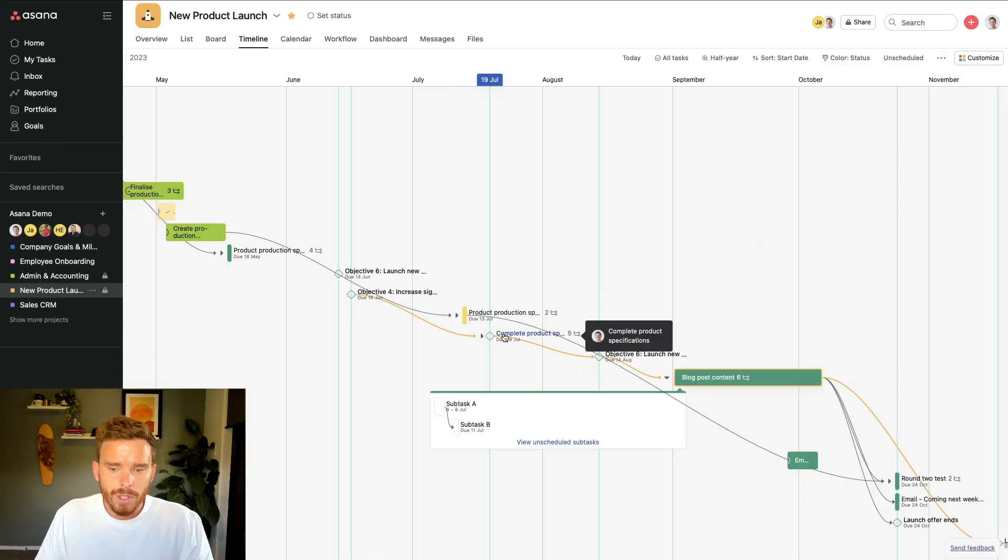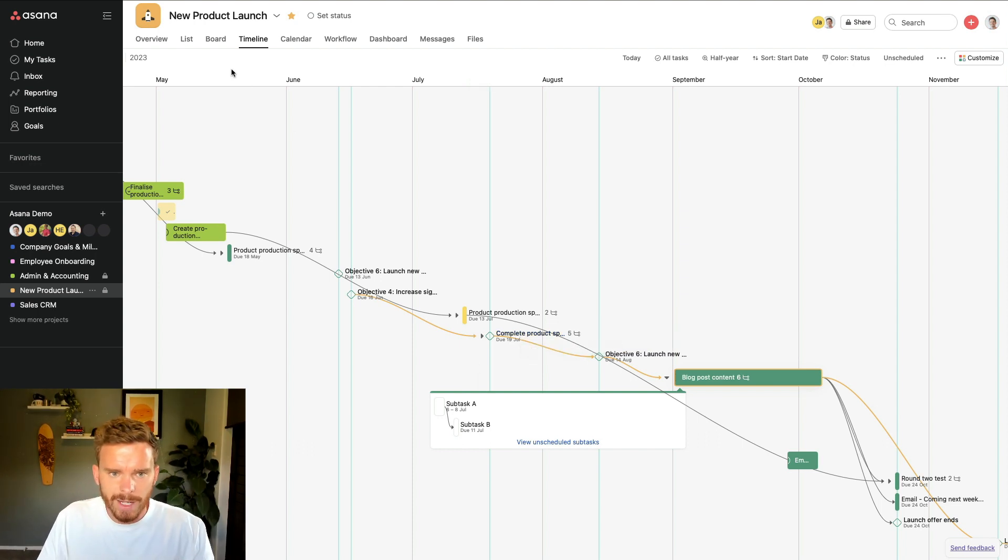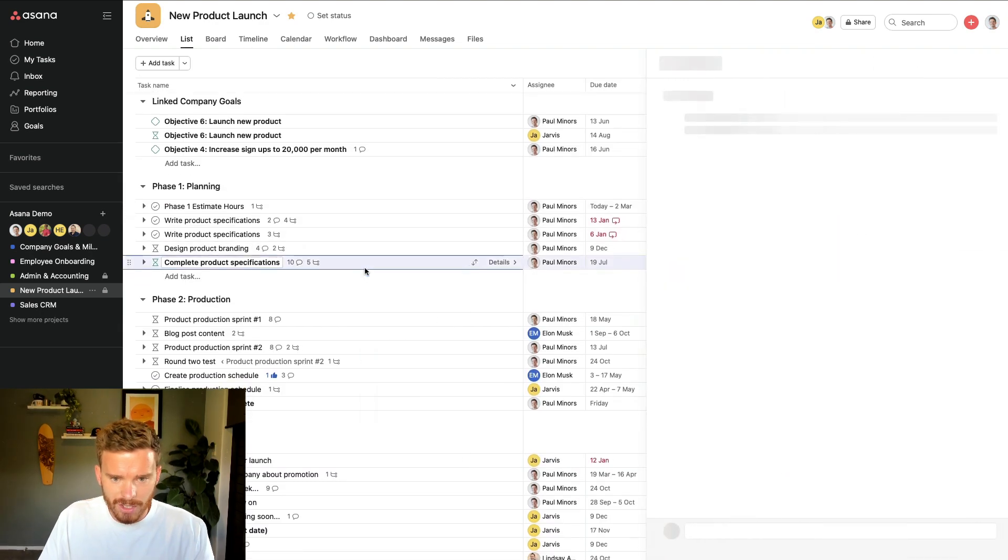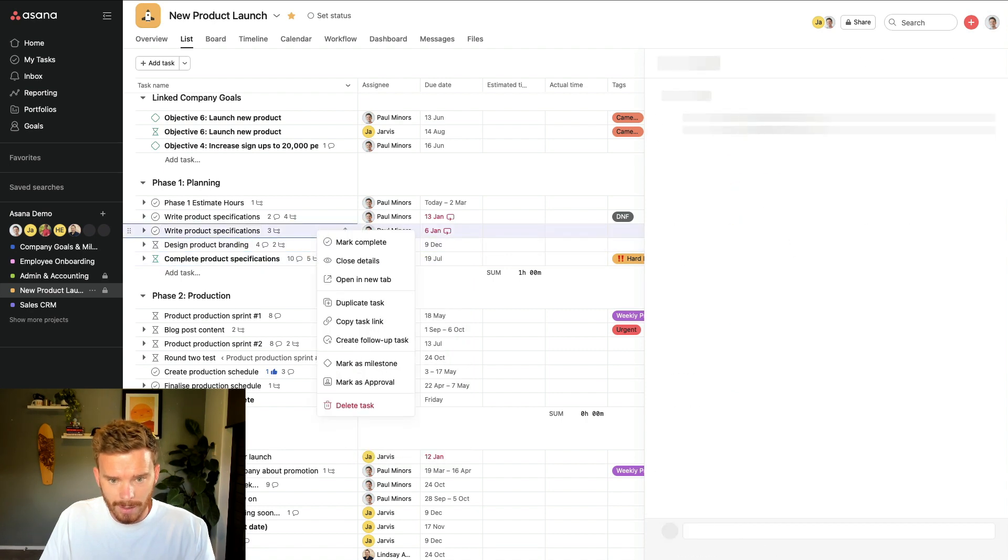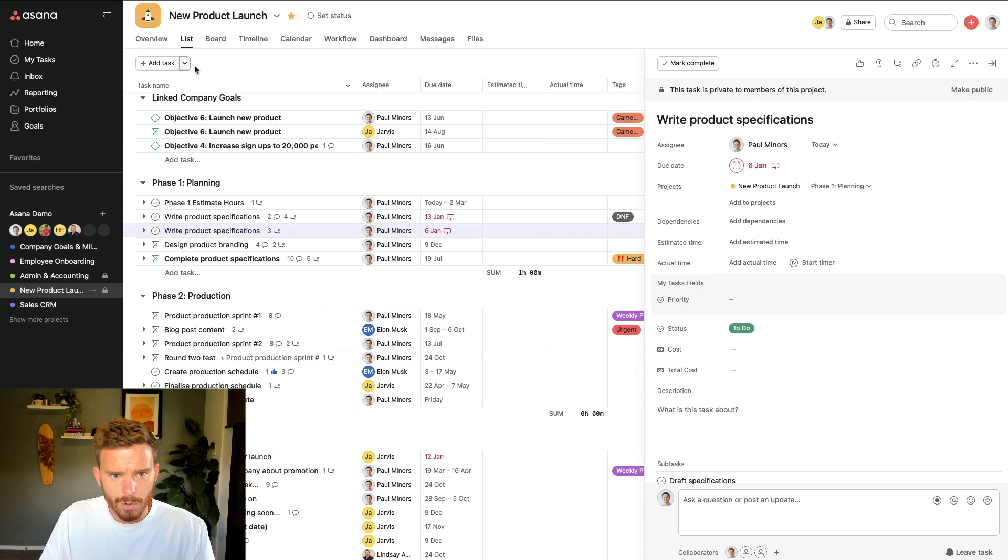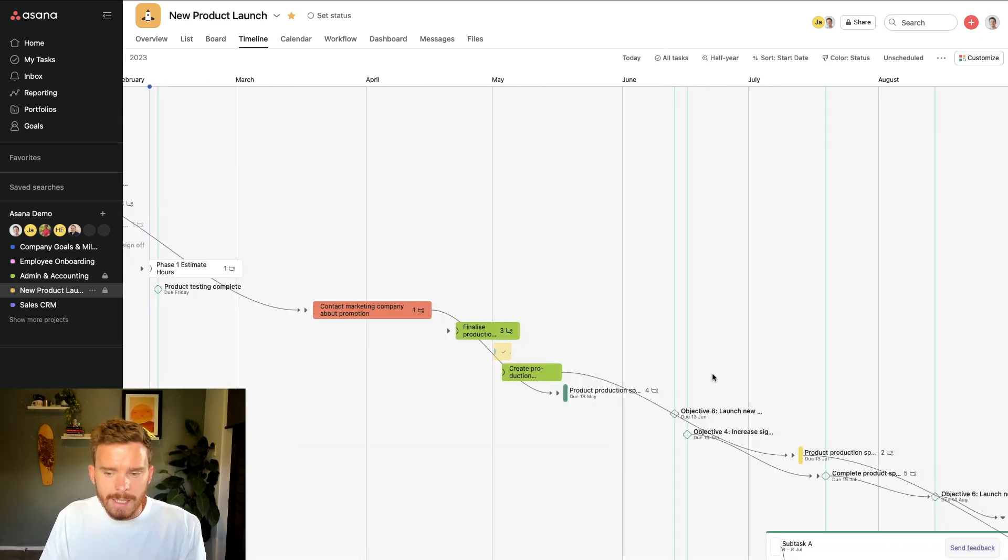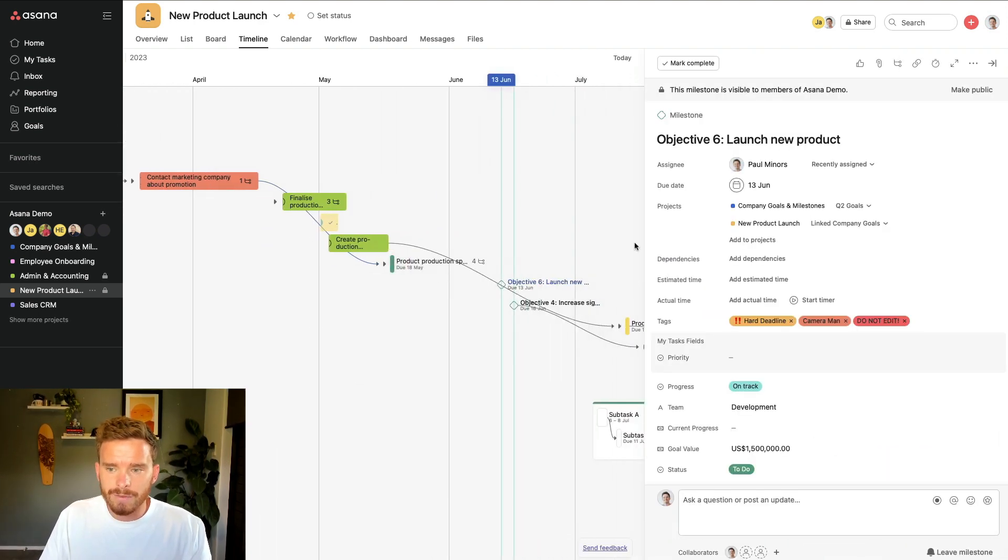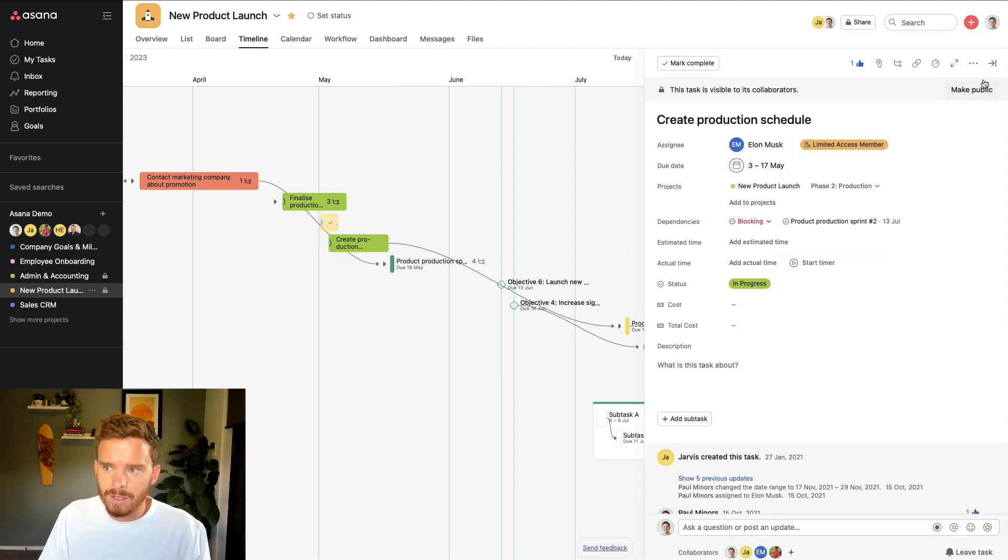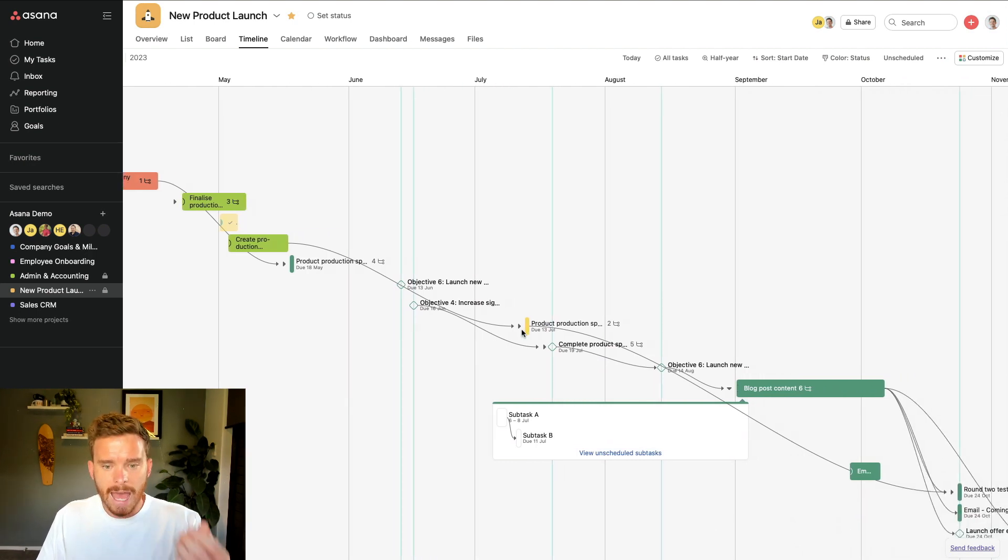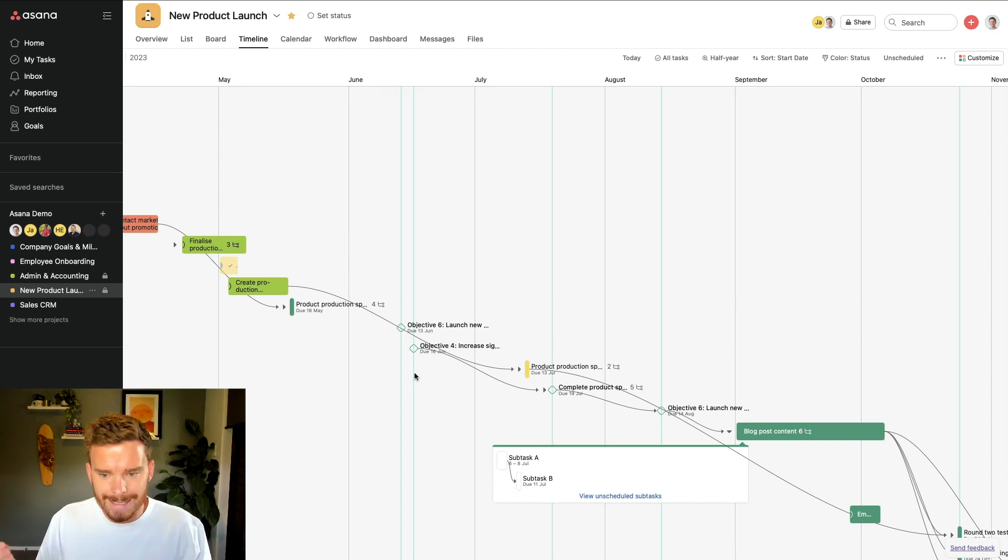Tip number seven is to make sure you are using milestones to highlight the important deadlines or due dates in a project. So I can do that on my list view. I can go to any of my tasks. And if I right click, I can mark it as a milestone or unmark it as a milestone. I can also create milestones up here. So milestones, they're very similar to regular tasks. The only difference is number one, they can only have singular due dates. I can't apply a date range to a task like I can with this one. Milestones are singular points in time. And so they are represented with this green line down the page. And so they are typically used for those important deadlines in the project.